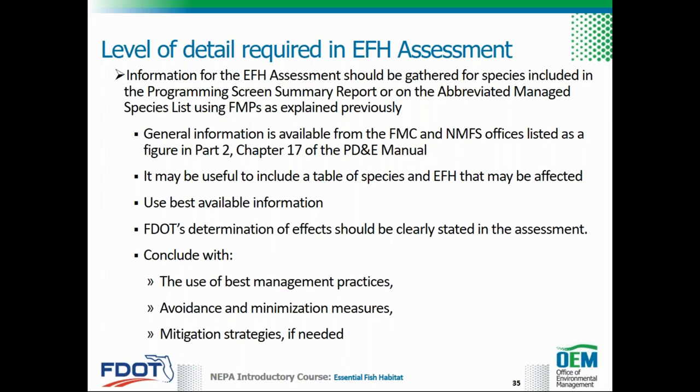It is recommended that the EFH assessment be concluded with the use of best management practices, avoidance and minimization measures, and mitigation strategies if needed. Any commitments proposed in the EFH assessment should be clearly listed at the end of the document. These commitments must be coordinated with the appropriate FDOT offices prior to submittal of the NRE or tech memo to ensure that the commitment is feasible.